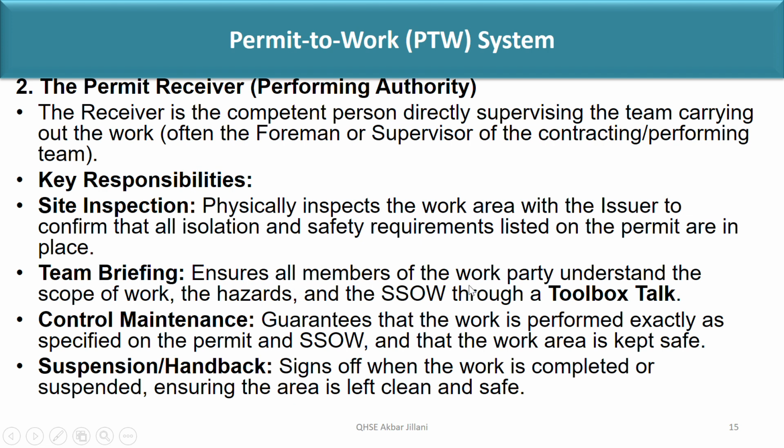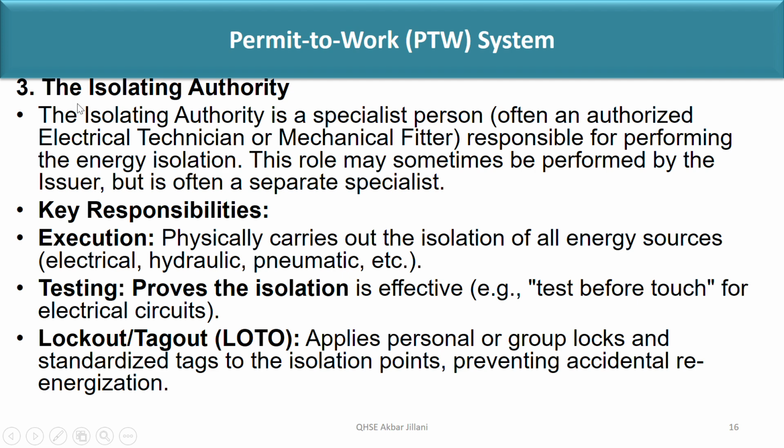Team briefing: ensure all members of the work party understand the scope of the work, the hazards, and the SSOW through a TBT. Control measures: guarantee that the work is performed exactly as specified on the permit and SSOW and that the work area is kept safe. Suspension and handback: sign off when the work is completed or suspended, ensuring the area is left clean and safe.